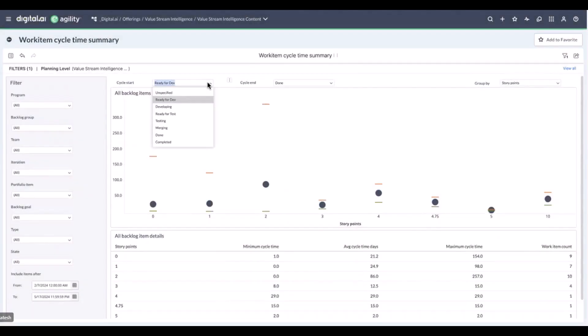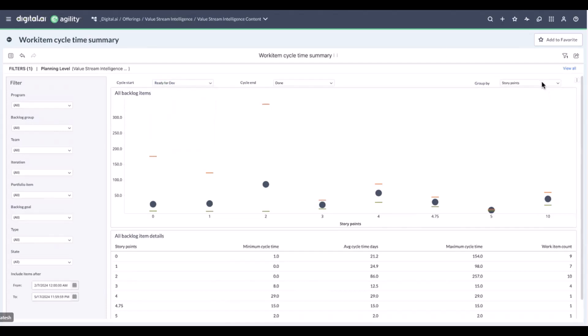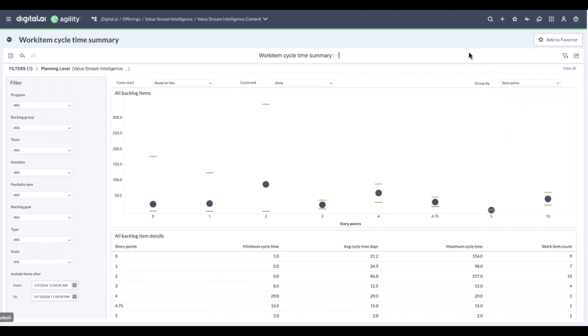The next dashboard I'd like to highlight is work item cycle time summary, which provides the average amount of time that it took for stories, defects, and testing to be completed between any two status lines you're selecting. So in this example, I've already selected two. And then there are a couple of different options in terms of how you want to group this. You can group this by type, so you can see what does it look like for stories, defects, testing, or by backlog story points, which is my current example.